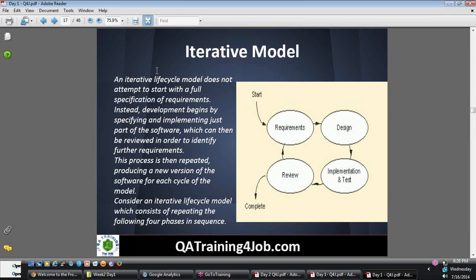Yes, if a user comes and tells you, okay, build me a website, and in that I want to put only hotel booking, that is the first iteration. Then you create the requirements, do the design, then code, test, and do everything. After that, you check with the customer: is this what you want? Then he'll say, no, I need something else. Add this, add that, remove that. Then I also need airlines booking. That will be another iteration.